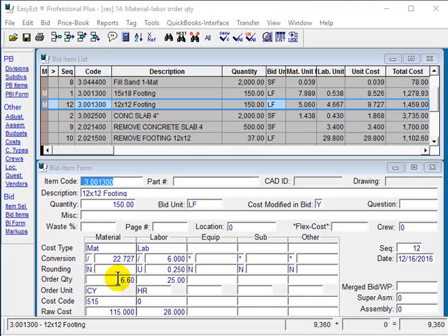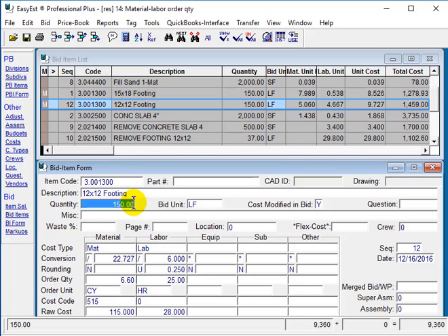Once you have made these adjustments, when you change the quantity, it will automatically take care of itself, so you don't have to do that productive rate again. If we put 300 in there, it's going to use these forced conversions that we have manually overrode in the system. And you can save this so you don't have to repeat this each time you use the items.